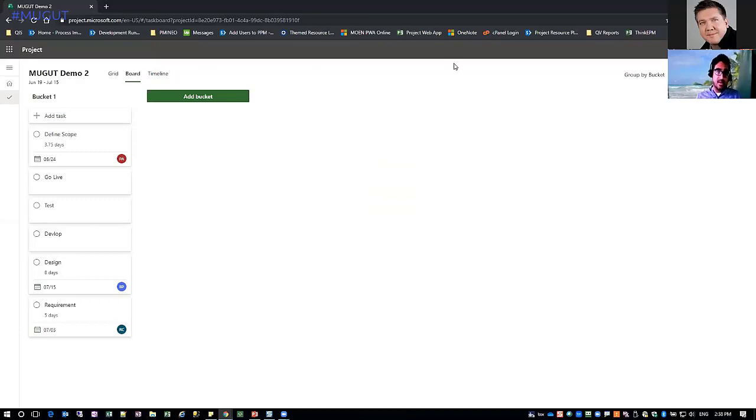But it is a big deal because if you see, Planner today does not have the ability to set up dependencies. You can set up dependencies in this tool. Planner today does not have the ability to add custom fields. So here the custom fields are being worked upon. That's a feature that's being discussed right now. Okay. In Planner, you cannot set durations and efforts and think like a Microsoft Project.